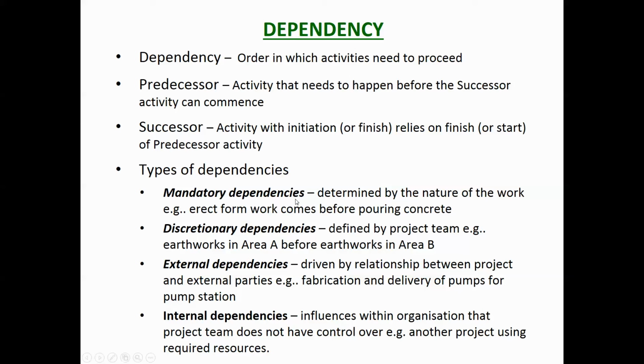Now the types of dependencies: mandatory dependencies. These are the physical nature of the works. So in the example we looked at before, you have to build the walls before you build the roof on top of the walls. So that is the nature of the work.